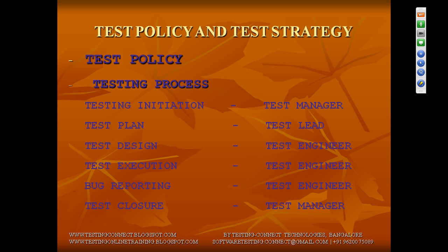Then your team lead or test lead will come up with the test plan. Before starting the project, the development team will be coming up with a development plan: how many releases, when each and every release starts, when each and every release ends, and for which release, what are the features you are going to develop. According to their development plan, they will be developing the application and sending it to you for testing.